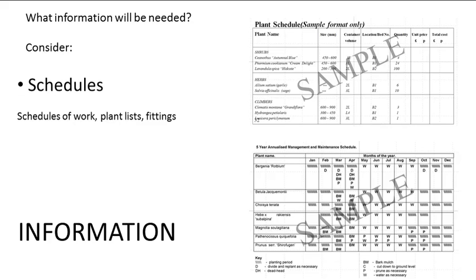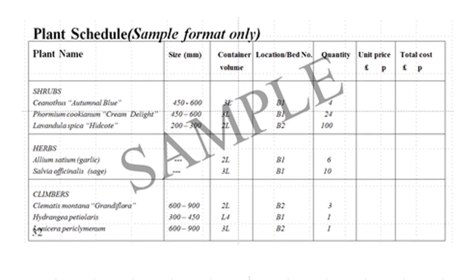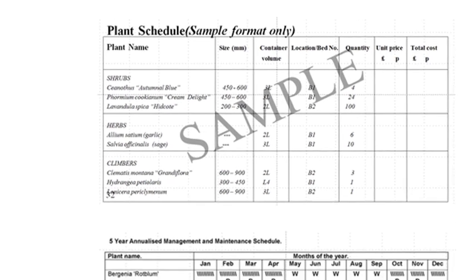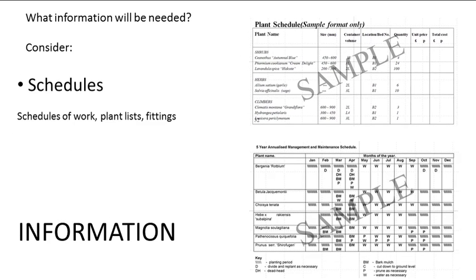Schedules and management plans are often included in the tender package, most often when associated with the soft landscaping, but also with Section B of the specification, if the client has employed a quantity surveyor to supply a bill of quantities. These would normally only be considered on jobs of £100,000 plus, as the job becomes too large to expect a contractor to quote for without providing a schedule of materials.